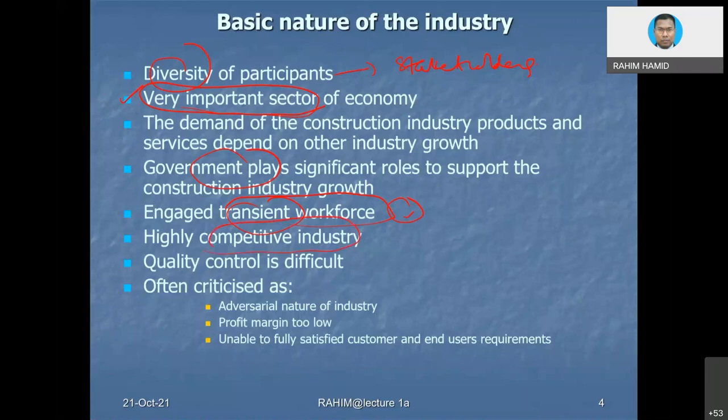Perhaps you have learned during the class SKAB 3123 about project estimating and tendering. There are different types of tender, for instance. One of them we call competitive tendering or open tender, okay? So when you are in the situation of open tender, you can imagine one project, and there are many contractors who would like to submit, maybe sometimes up to 100 submissions. Meaning to say it is very competitive.